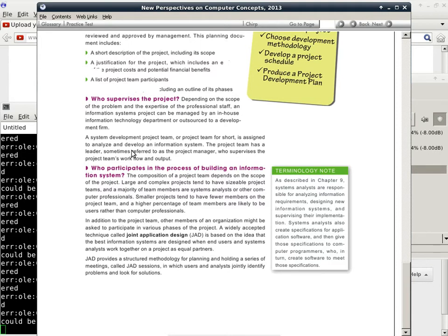Because you don't want a whole team of programmers and systems analysts being the only people to design the system, because it may be technically very superior, but if the user interface is inferior, nobody's going to like it, nobody wants to use it, and then you have a big problem at the end of the entire project, because when you roll out the system, nobody wants it. Then it becomes a very expensive system that is capable and yet ineffective at the same time.